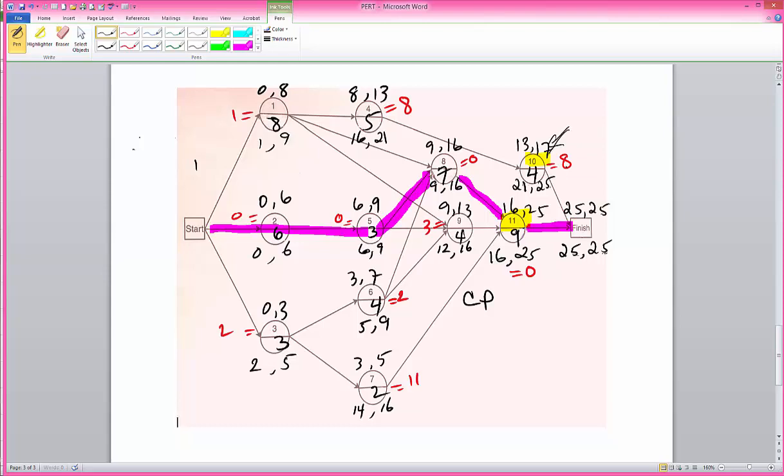The differences between the 17 and 25, and I have used 25, which then, because finish node is not really an activity, it's a point in time when the project finishes, then if I add 25 and 0, I get 25. Using that 25 to be my latest finish time, then I can work it backwards, and that gives me no slack for activity 11, but 8 units of slack for activity 10. Accordingly, we compute the critical path.